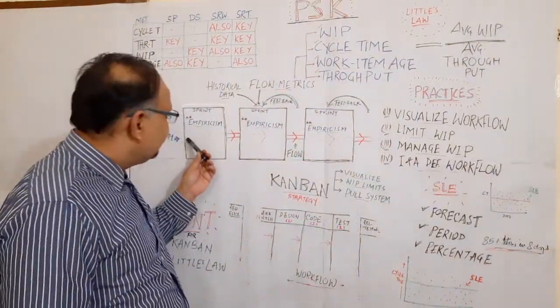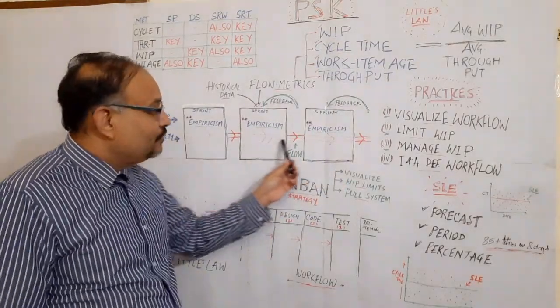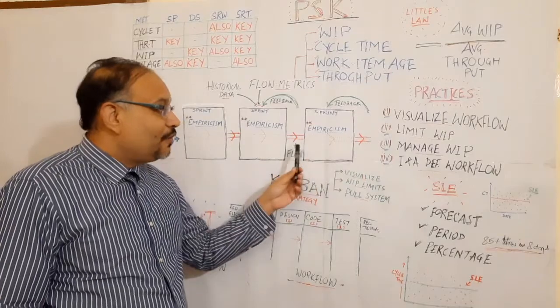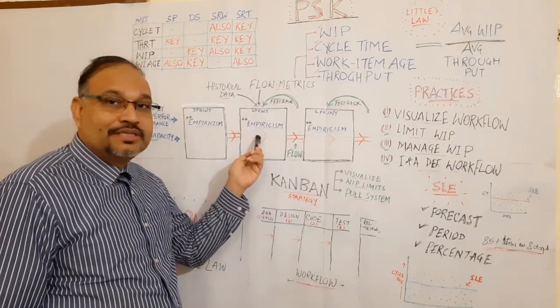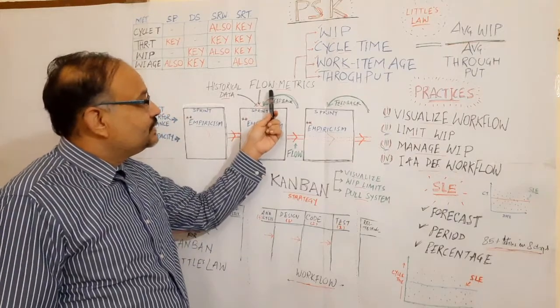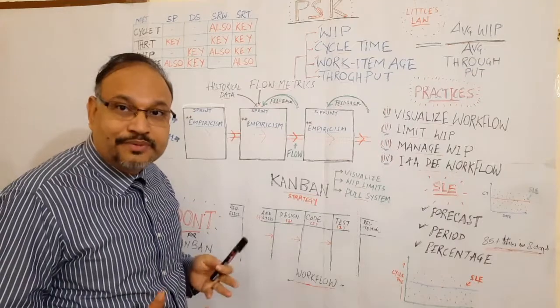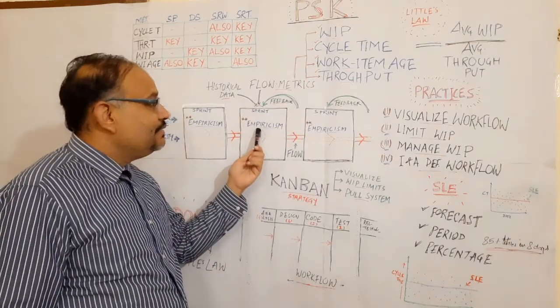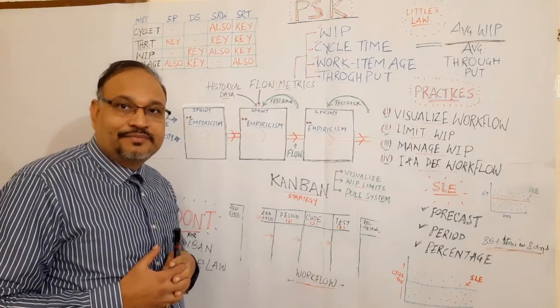There are sprints happening one after another at a regular cadence. Underneath is the flow of value. To optimize this flow, we provide regular feedback to the sprint in terms of the flow metrics and historical data such as cycle time and throughput, so that the empiricism, which is at the core of Scrum, gets strengthened.